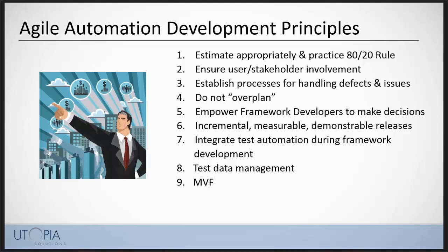Like a high-level plan for the project, maybe taking some things and breaking some things into sprints. And maybe don't think about your entire project. Think about a piece of functionality, and can you apply Agile to that? Execute some small, short duration sprints, and then review your results. Hold a retrospective. And again, minimum viable functionality is key here.